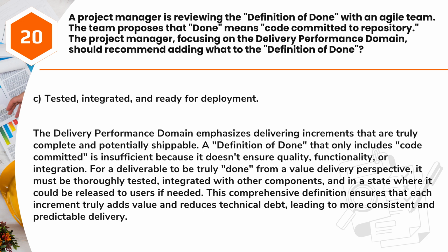Answer: C. Tested, integrated, and ready for deployment. The delivery performance domain emphasizes delivering increments that are truly complete and potentially shippable. A definition of done that only includes code committed is insufficient because it doesn't ensure quality, functionality, or integration.